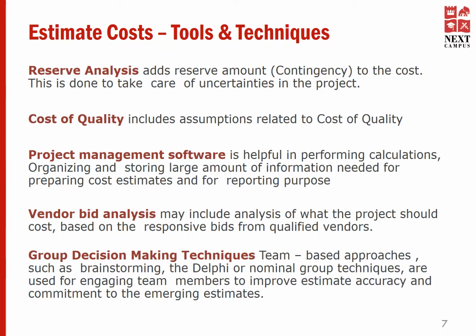When it comes to agile practices, agile uses a widely adopted method called planning poker, which allows the team members to vote and indicate their estimates, and at the end of the process they're going to collaborate to make the final decision.